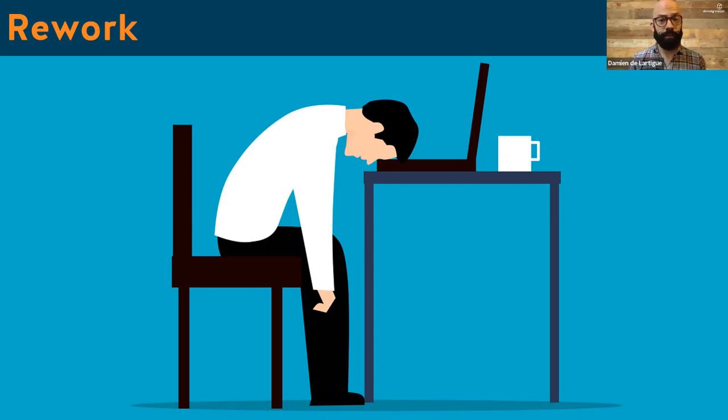Rework can happen for a variety of reasons, such as lack of supervision, insufficient information, limited resources, or failed communication, most of which could be avoided through better data sharing. In general, it negatively impacts projects, causing time and cost overruns. Most subcontractors and trades would agree that rework is avoidable when given the right tools, but not many know the true cost of rework in construction.